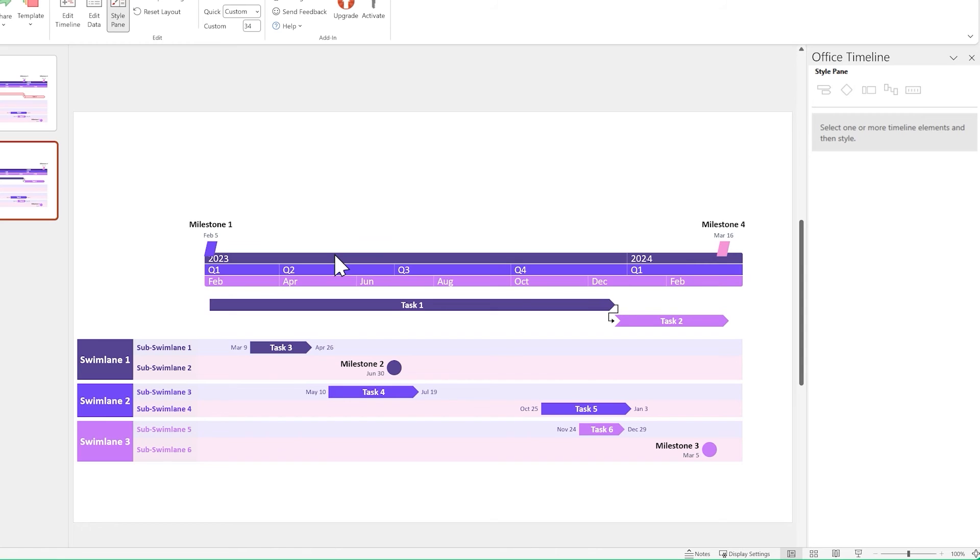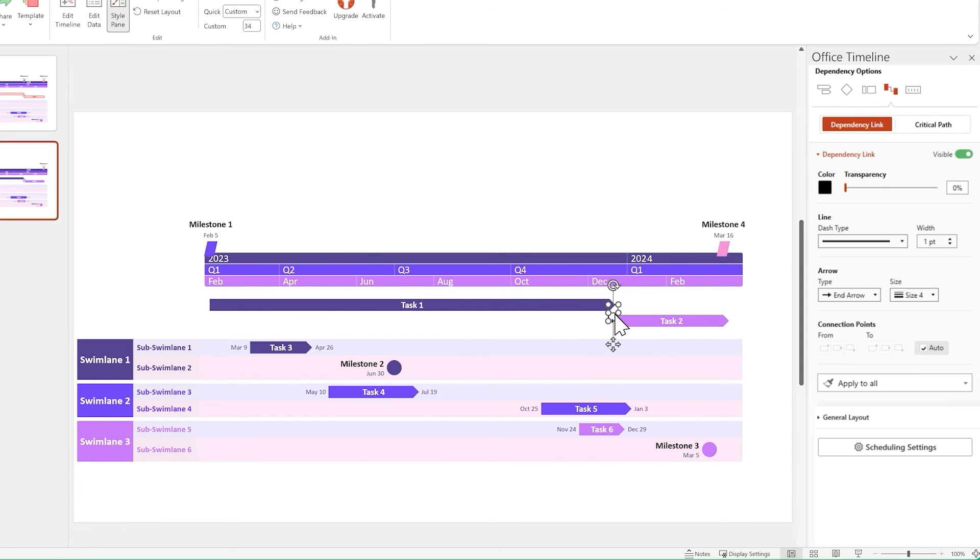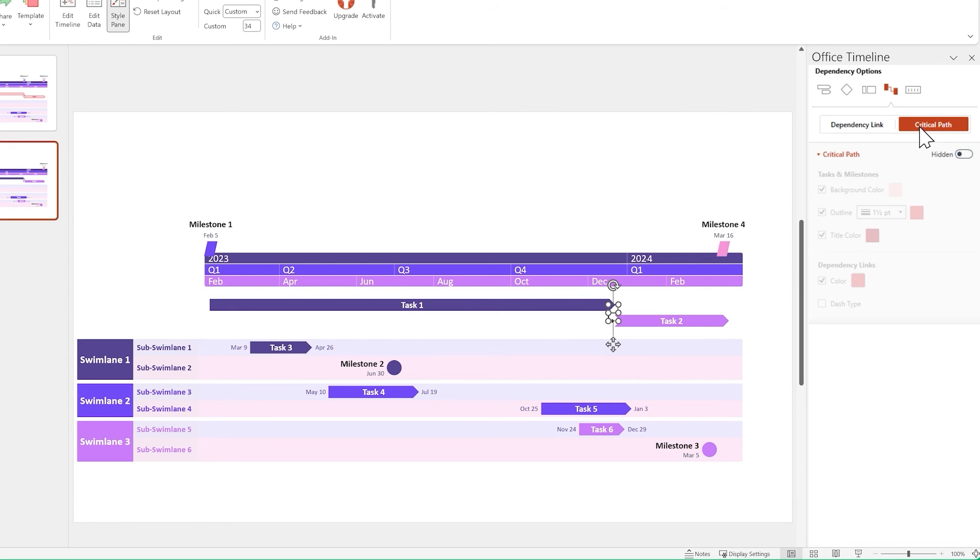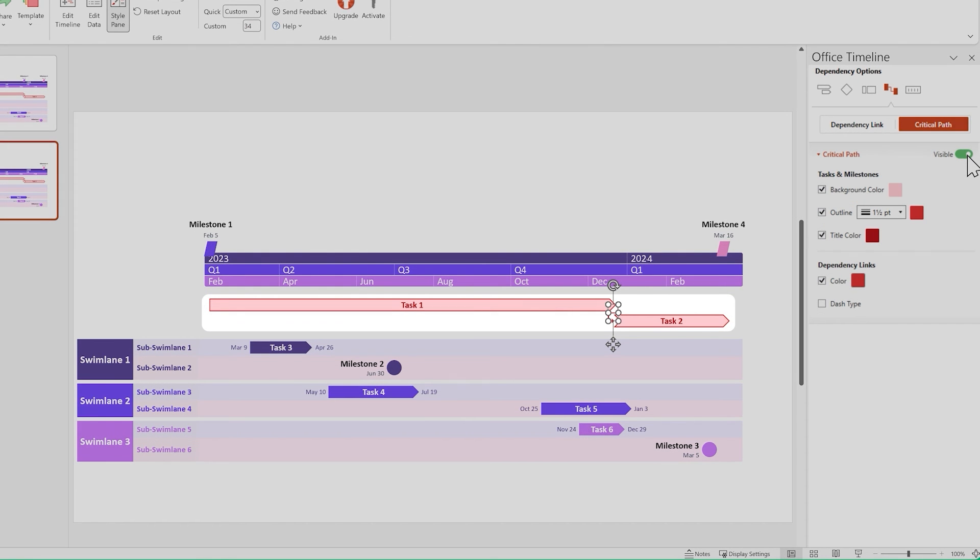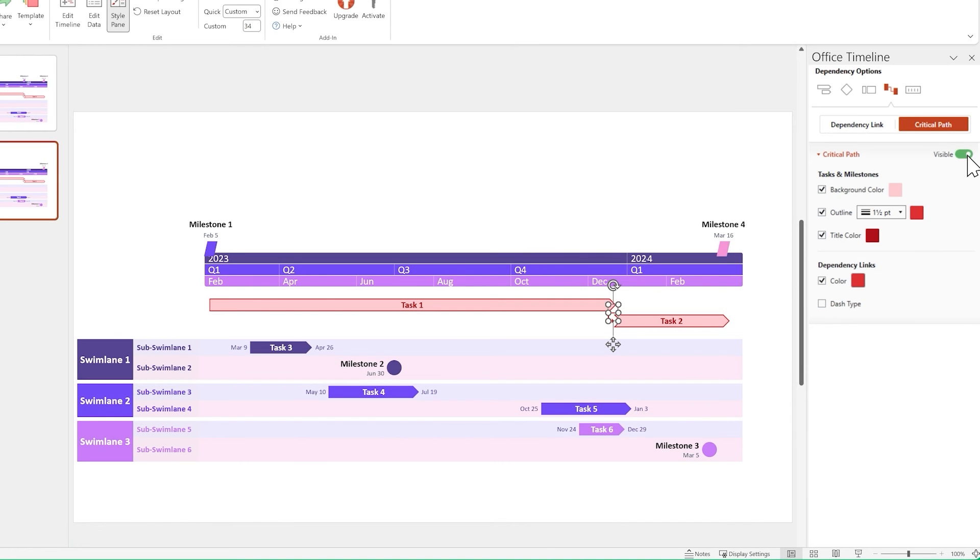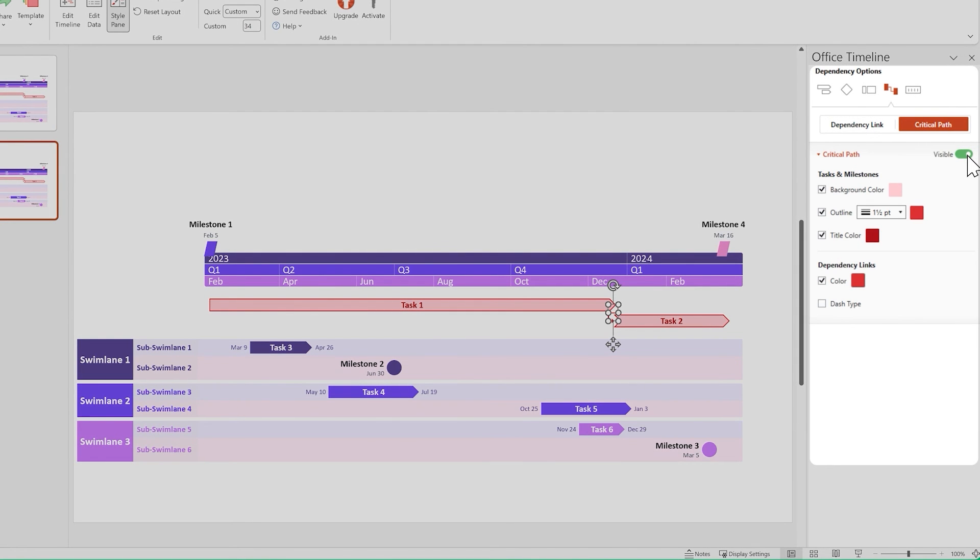After you've set up your dependencies, make sure you've got a dependency link selected. Now go to the style pane and switch over from dependency link to critical path, then turn the toggle from hidden to visible. You should see the critical path highlighting the chain of linked dependencies going up to your latest scheduled item. And if you want to customize the way it looks, you can do so from the style pane.